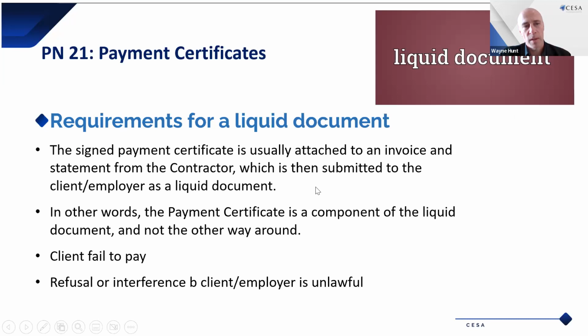Okay, then we'll just discuss quickly the requirements for a liquid document. The signed payment certificate is usually attached to an invoice and a statement from the contractor, which is then submitted to the client or employer as a liquid document. In other words, the payment certificate is a component of the liquid document and not the other way around. Just to clarify, a liquid document is when one party is obligated to pay the other party. That obligation has arisen at the time that the consulting engineer signs that payment certificate.